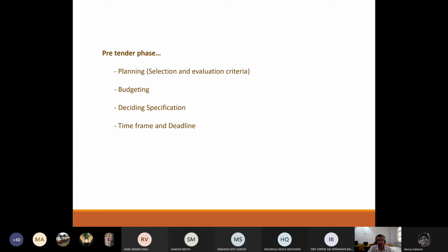What do I mean when I say shuttering work? That means if he has to make large slabs, does he have an adequate amount of shuttering or formwork to be able to cast large areas of slabs together? So that is one aspect on the basis of which you decide. If your work is of a crore, then naturally you will not try to take a contractor who has done a 10 lakh job, because he will not have the capacity to invest money for a job that is of a crore.